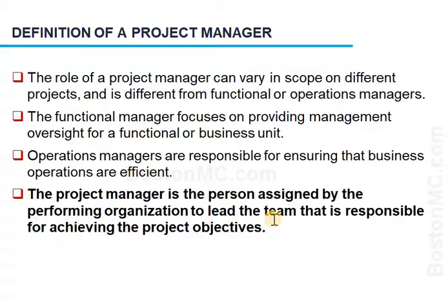on the project. What the PM should really be doing is meeting with stakeholders, understanding their requirements, confirming that what has been delivered met their expectations, listening to issues or problems that are being raised by the stakeholders or by the team, facilitating the acquisition of the needed resources to get the project done, dealing with changes as they come up, dealing with conflicts that may happen within the team internally and externally, and dealing with crisis whenever it hits, and at the same time being able to respond to the sponsor's request for up-to-date information and ad hoc meetings.